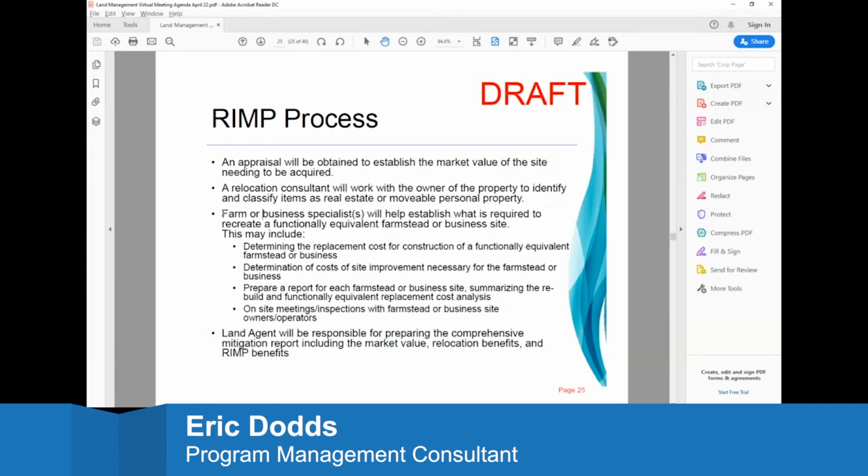We've had several discussions about how best to do this. We've had discussions with the NDSU extension staff. We've also been looking into the extension information provided by other land grant universities, Wisconsin, Minnesota, et cetera. We're starting to have some conversations with some of the farm building suppliers like Gateway Building Systems and Superior Grain Bins. They all supply this type of farm equipment, and we're going to be working towards building a rate sheet that would identify the costs of those components, and then we can build up a cost estimate based on that rate sheet for each of the impacted farmsteads.